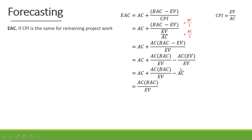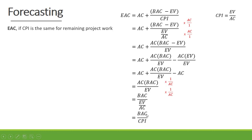Now the plus actual cost and minus actual cost cancel out, leaving us with actual cost times budget at completion divided by earned value. If we multiply above and below the line by one over actual cost, the actual cost cancels out at the top. So we get budget at completion divided by earned value over actual cost. Since earned value divided by actual cost is our cost performance index, we replace it with CPI, giving us budget at completion divided by CPI.